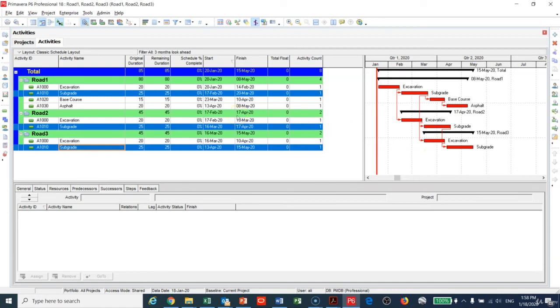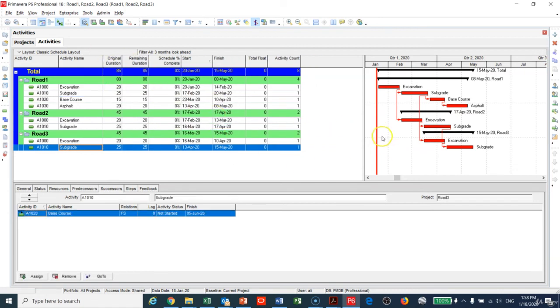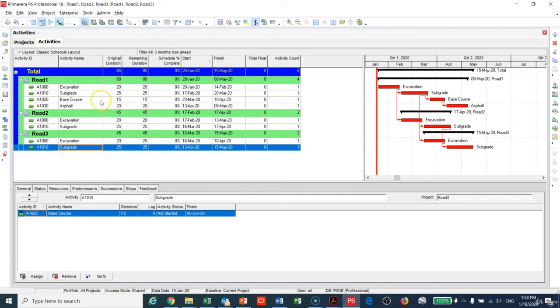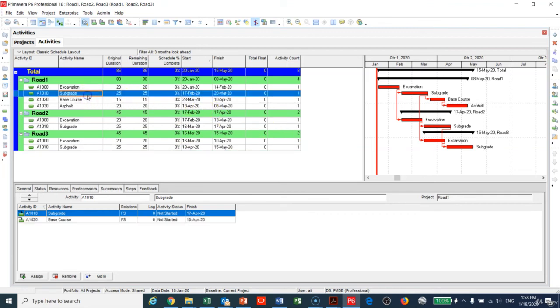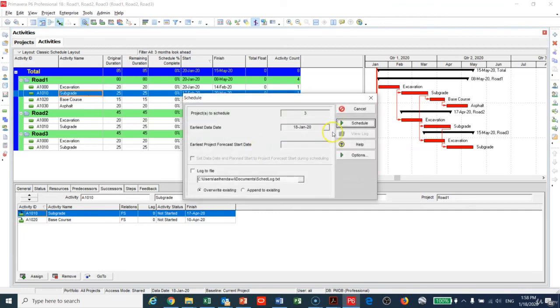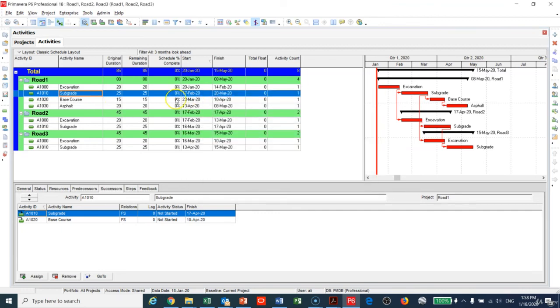You can continue—if you have a big project you can go and continue tying the three projects together. After you do any of the orders in P6, P6 does not understand anything until you make F9, which is Schedule, to calculate the project.